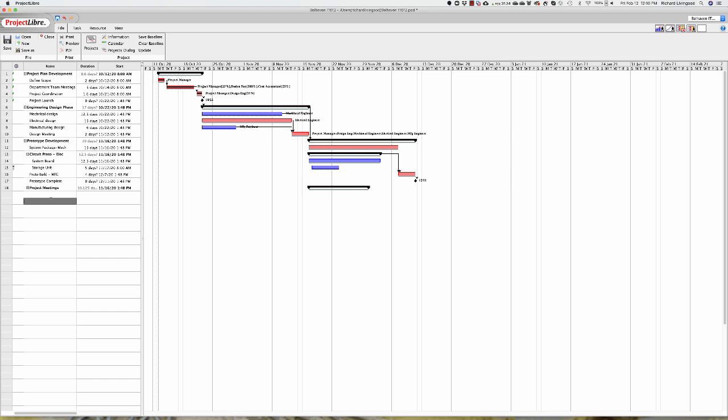sometimes it goes over. Now, earned value still applies here, but the problem is you are either costing more to do the project or you're chewing up, if you will, some of the reserve that gets left over. So again, if the department team meeting took 4 days, but the project coordination took a full 2 days to do instead of the 1.6 days, or about 1.5, we had intended for it to take, we could apply, from the standpoint of dollar reserve, some of that toward the overage for project coordination. Now, it all flows together. So in the end, it depends on where the project is at the moment.